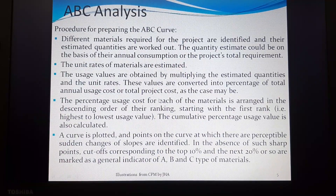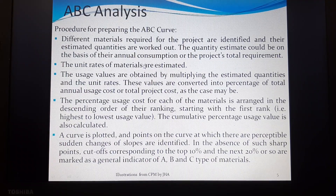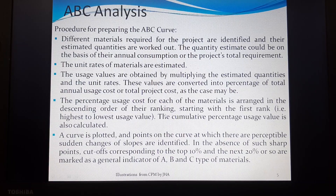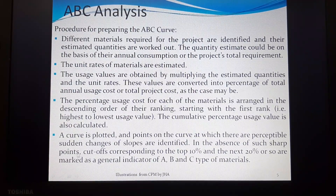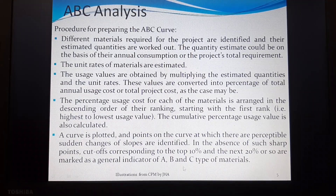To prepare ABC analysis systematically: different materials required for the project are identified and their quantities are estimated; unit rates of materials are estimated; usage values are calculated; then percentage of usage and cumulative percentage are computed. A curve is then plotted and points on the curve where there are sudden changes in slope are identified and categorized as Class A, B, or C.